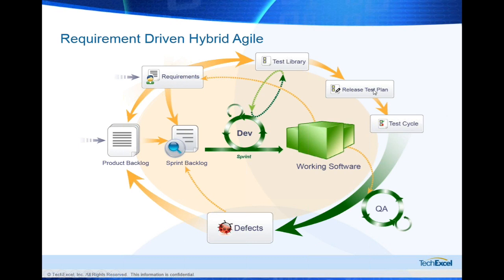And it's also fully integrated with regression testing, where a release testing plan can be created, multiple testing cycles can be carried out, and the defects found can be submitted directly into the product backlog, and occasionally, as needed, a defect could be assigned to the current development sprint.